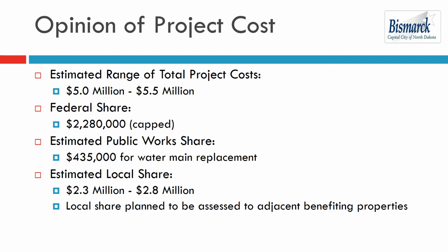We want to provide some financial information in this presentation. In total, the project is estimated to cost $5 to $5.5 million. These costs include concrete pavement repair, pedestrian improvements, landscaping, lighting upgrades, water main replacement, engineering services, and then we also have some contingencies built into these estimates.